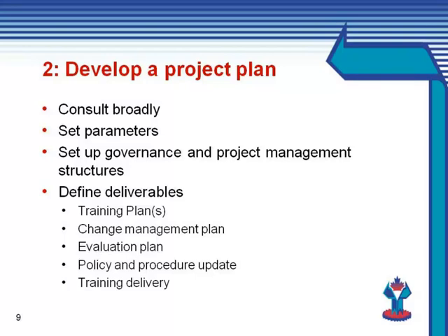A change management plan is helpful in creating and maintaining support and acknowledges that the Essential Skills program will affect people in the way they do things. Here are some success factors in managing change. The implementation team and key stakeholders can clearly communicate the need for change and the vision of the end state. Senior management is fully committed and willing to walk the talk about essential skills. Resistance is anticipated and counteracted. Spokespersons and key messages are identified. All employees, apprentices, and managers understand the benefits and how the process works.